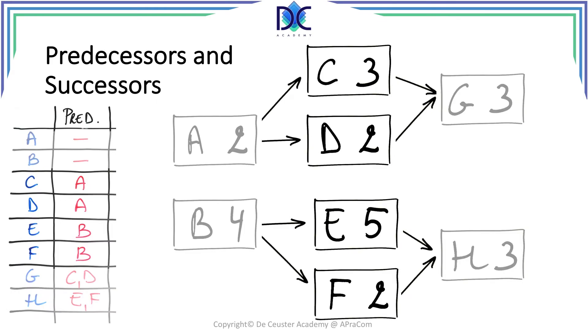The intermediate tasks C, D, E, and F have both predecessors and successors. And we link the relationship between predecessors, successors, and the different activities by arrows. For example, the arrow from A to C shows that A has to be finished before activity C can start.